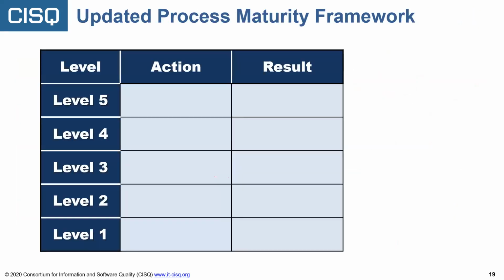So let me summarize a reconceptualization of the process maturity framework. Level 1, we all know, well, I don't agree that level 1 is performed. I know that that's the way it is in CMMI, but until you establish a level 2 capability, level 1 is not stable. Why? Because at level 2, I get control of managers. I get managers to start building plans and incorporating the staff in building those plans. And in a level 1 environment, without those controls in place, a manager can walk in and give you an idiotic schedule that throws you into a death march project, and everything goes out the window.